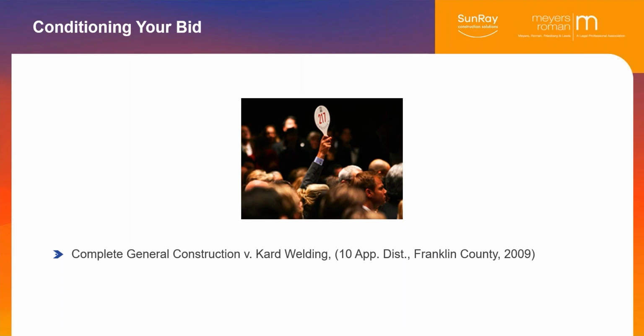And what happens is you're not going to perform because it's already past that date by the time you get to the lawsuit. And they have found a replacement contractor, and they are going to charge you the cost over your bid as damages, and they're going to win.